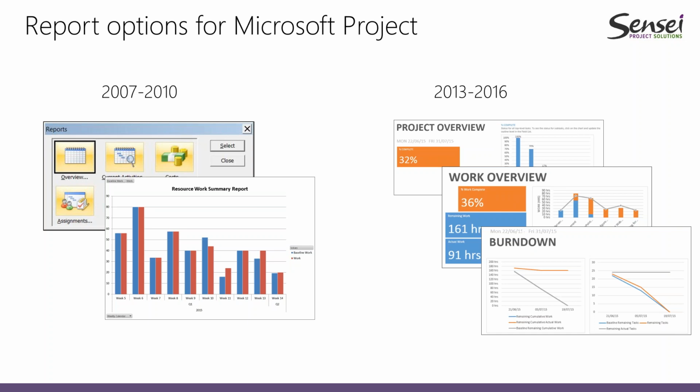From there, we can create a couple of good reports and some nice visualizations, which are connected to our data, which means that every time there is a change in our schedule, every time there is a change in one of our tasks, that change is reflected in the reports that we have. So we do not have to do a manual export process to create the reports because they are already consuming live data from our schedule, which was a big difference.